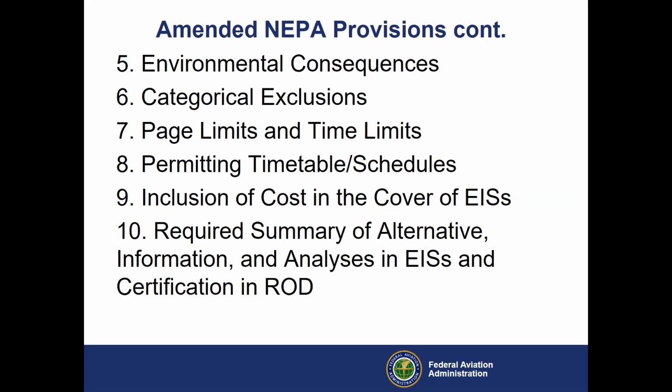This is a separate and distinct provision from the original provision in the amended regulations, which allows for agencies in their NEPA procedures to establish a process that allows the agency to use the categorical exclusion listed under another agency's NEPA procedures after consulting that agency. The amended regulations also require the adopting agency to document the adoption.